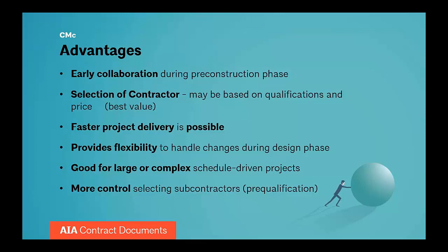Quickly, here's some of the advantages of CMC project delivery. There is no single construction delivery that is best for all projects in all circumstances. We'll usually find CMC used on a large or complicated project, especially one that needs a high level of similar project experience due to technical complexity. We'll see it on projects that are schedule sensitive or projects with difficult or unusual site constraints. It takes both a more experienced contractor and more experienced owner to successfully manage and use CMC delivery. Last, a big advantage of CMC is that the contractor often is selected based on qualifications, not just price.